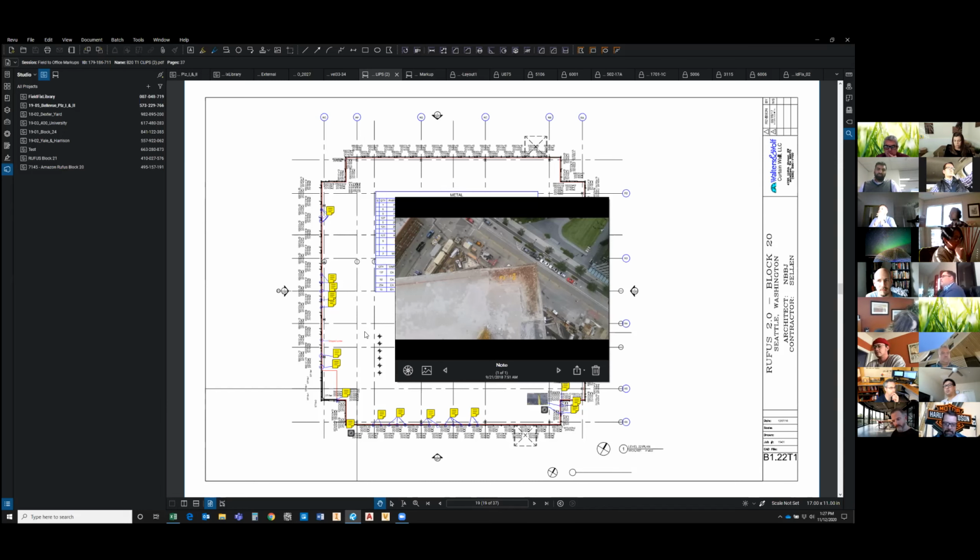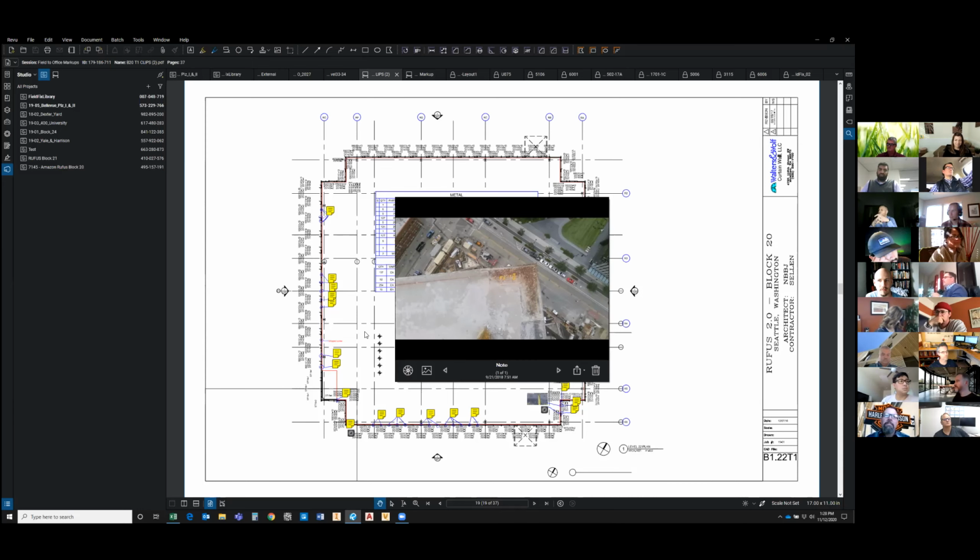So if there isn't an existing field fix that the PM can determine, then he'll go to the engineering group and they'll draw up the detail for that, and then that would be done. At that point they'll email the engineering group letting them know that, hey, that's there, but they don't need to give them all the information since everyone has access to this, so they can go to that.